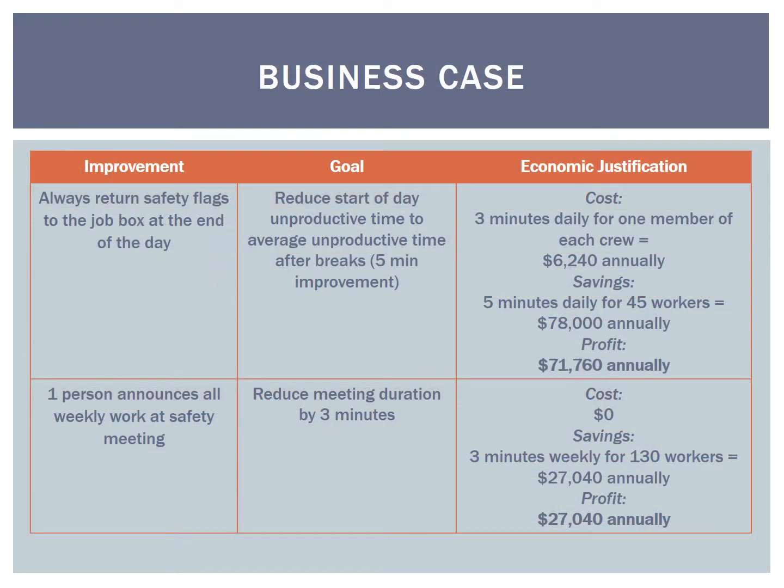An economic analysis was then performed to further assess the remaining 4 process improvement ideas, and they are listed in descending order of annual profit. For these calculations, it was assumed that workers cost Webcor approximately $80 per hour.